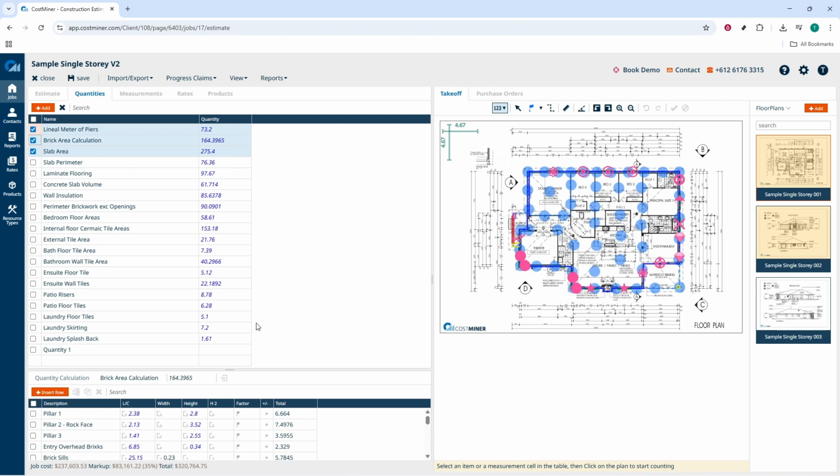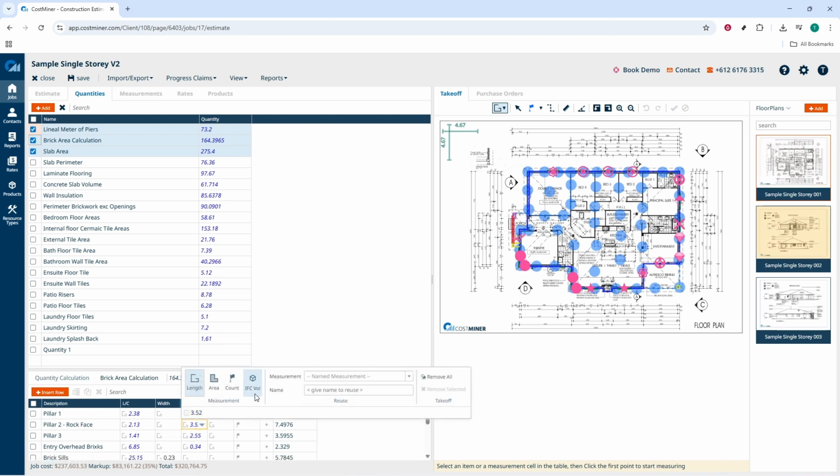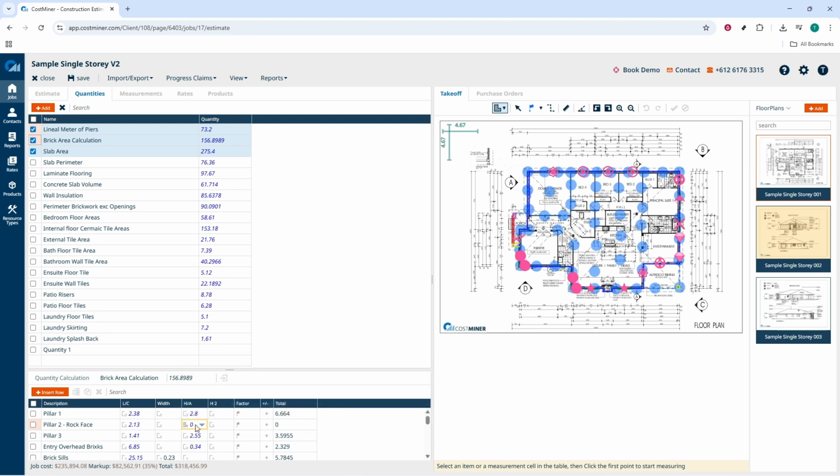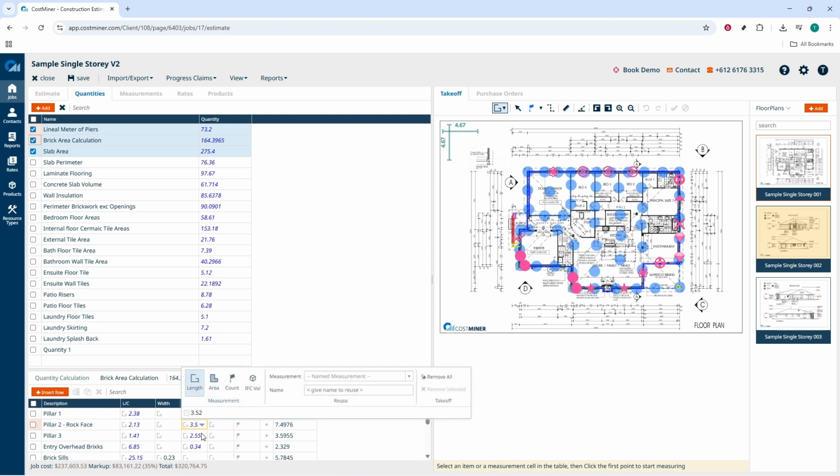With this approach, you can generate multiple, consistent CostMiner estimates quickly, compare them side by side, and provide clear pricing paths for your team or client, all without ever risking the integrity of your master estimate. Finally, keep your naming consistent and add dates or version tags so stakeholders immediately understand what each estimate represents. A simple changelog helps with auditability.